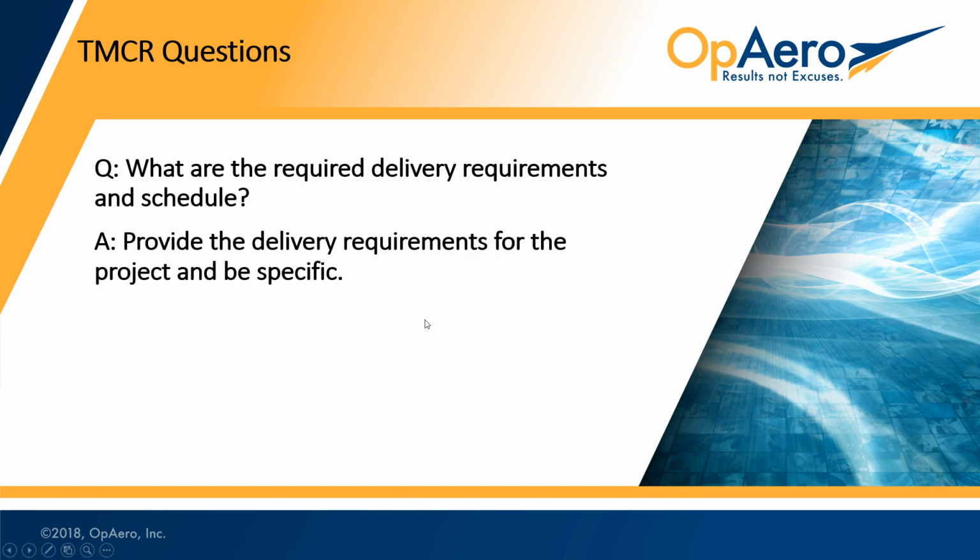So what are the required delivery requirements and schedule? We said this a little earlier with your period of performance. This gets a little bit more specific. You want to lay in all your delivery requirements in here, and we've already touched a little bit on whether it's going to be a CD-ROM, a DVD, a database, any kind of specifics that you want delivered from that project development, you have to lay in here.